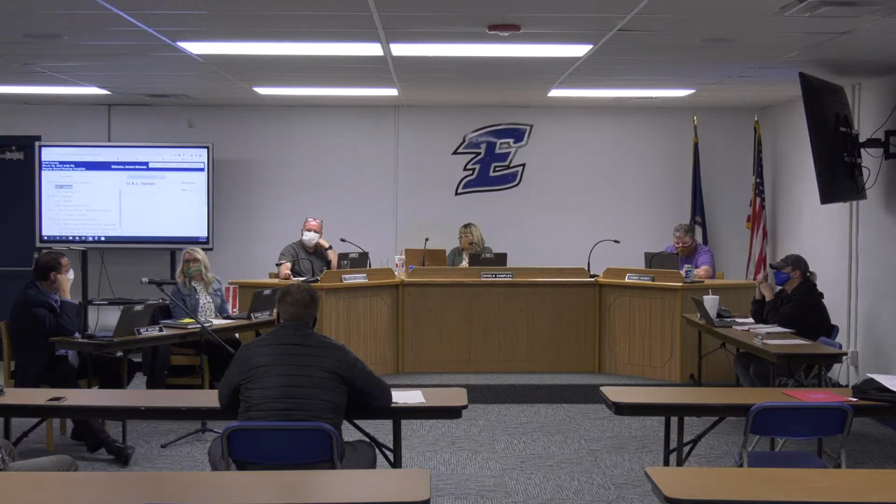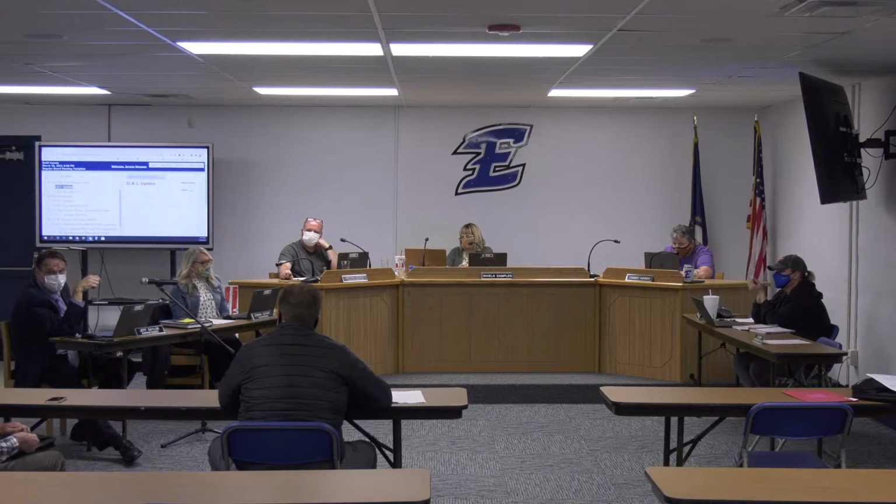For sure, appreciate that. One update: that alternate, what was the parking in the front of the high school? It was alternate 3, for the 30-some parking spaces in front of the high school. And then, of course, once we got the gas line mapped out where it was at, the gas line was in the way. Columbia Gas will not let anybody touch that gas line, even though we've got contractors on site that could probably move the line or at least dig the ditches. They wouldn't let us do anything. For that price, I'd do it myself.